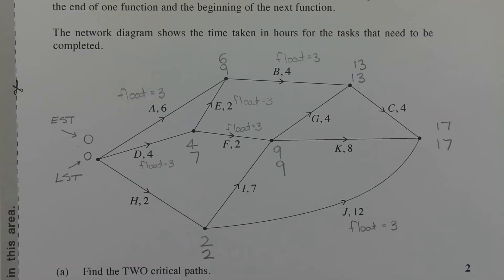So let's determine the float time of each task. If we look at task J. Seventeen. So take the LST after the task, subtract the time that the task takes. So seventeen minus twelve. Then subtract the EST before that task. So seventeen minus twelve minus two gives us a float time of three. So J is not on the critical path. Let's look at K. Seventeen. So LST minus the activity time minus eight, minus nine gives us zero. So K is on a critical path.